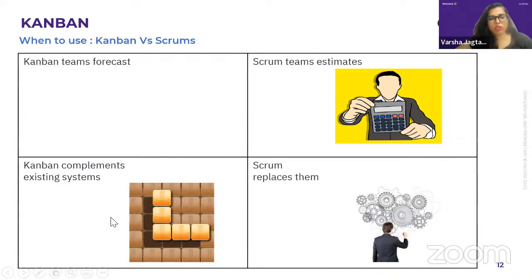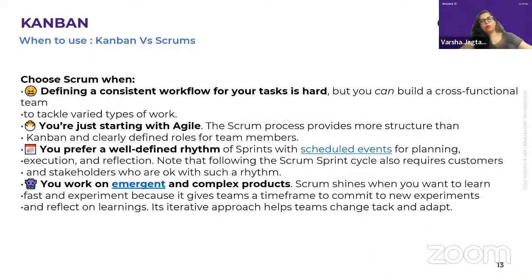So as I said, I have a basic version which has been delivered now, and maybe now I just have to add incremental requirements or some value-added thing, or whatever a customer is saying. Then maybe I would use Kanban. Scrum is basically if I want to design a system where earlier it was on a mainframe and now I have to go full-fledged web. I can't just use Kanban, because that requires many user stories or approaches, many goals that should be clearly given to the teams which they can deliver. We will discuss the same thing further, like when to use Kanban versus Scrum.